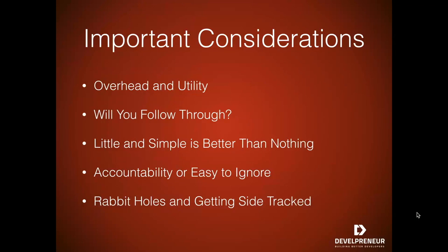But the other thing you've got to watch out for yourself is where you build this really awesome plan of milestones and tasks, and then you don't actually touch any of those things again until you're done. You have like 20 tasks to do for release, and the only time you ever touch those tasks again or even look at them is when you've completed them on that release. That doesn't really add a whole lot of accountability to yourself. It's better than nothing, but you'd rather have something that's tapping you on the shoulder on a more regular basis.